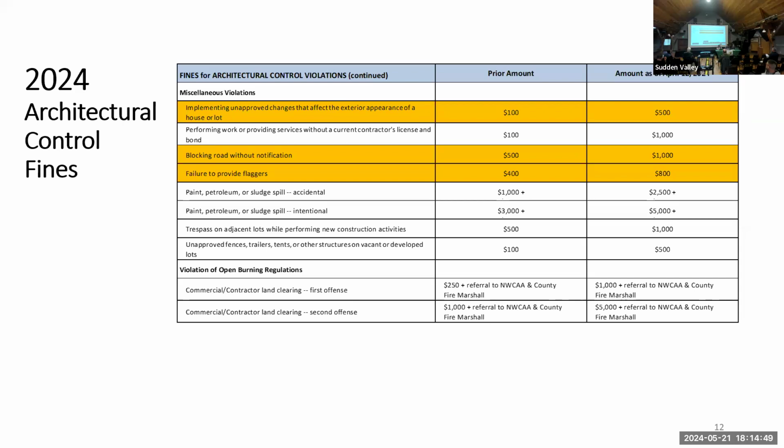If you find that out and you need to make a decision about making that change, you need to bring that back to the committee. If you leave it until the final inspection, this fine then comes into play because you have implemented a change to your original design, right? And you haven't asked the committee about it or informed them of it.